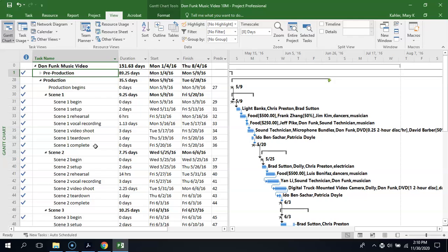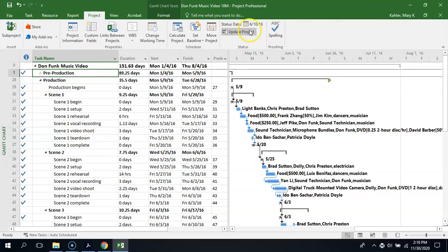So you have to make sure that you are tracking completion to an appropriate date. You have to make sure that you are setting your status date, and make sure that you are adjusting any actuals as far as resources that have worked more hours or less hours than they were intended to work, or additional material resources that you used. I didn't go over cost resources with that because of course you apply those at the time, so you would do that the same way as well.